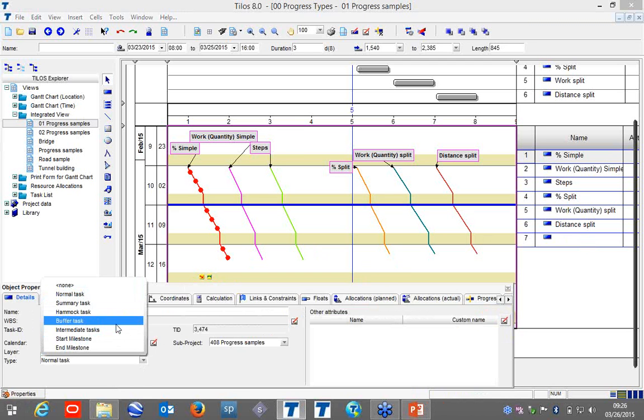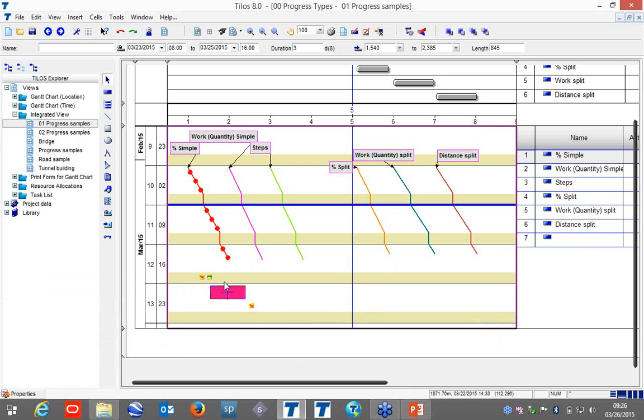Instead of putting contingency periods on each task, we can put these values at the end, so it will consume from here. Initially, you can say you have 1 month for this buffer task, and later when you link this task with the other tasks, when it is going to finish, it consumes from this buffer task. So this is another concept.